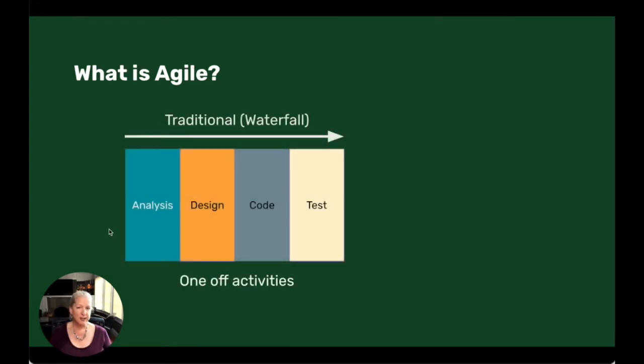This is a visualization of what Waterfall is, or what I like to call what we did before Agile. In Waterfall, you do lots of analysis and requirements writing up front. Then you do a bunch of design, your UI, UX, wireframes, all of those things. Then finally, you throw it over the wall to the engineers and say, go ahead and program that for us, throw it over to QA, and then eventually it gets released. So it's a lot of time in each phase and handed on to the next phase. This can be anywhere from a couple of months to a year or several years.